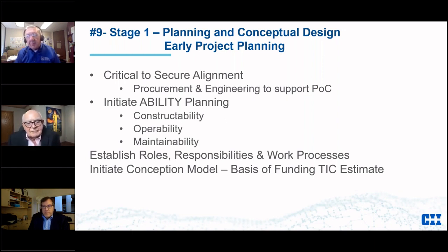The other thing is to establish roles and responsibilities and work processes that are going to support this. And also, you're going to initiate that conceptual model I told you about, and that's going to become the basis of the TIC estimate. So all the things you're setting up here are the basis of my estimate, and that has to be the plan going forward. Because if you put in that estimate, and then after it's been submitted you decide to change the plan, you've got a problem.